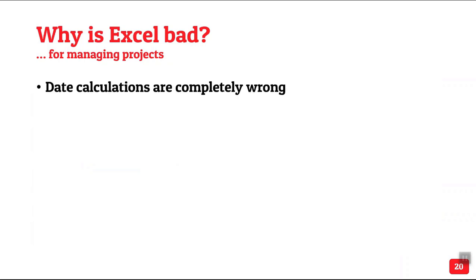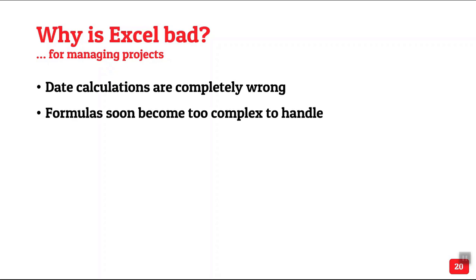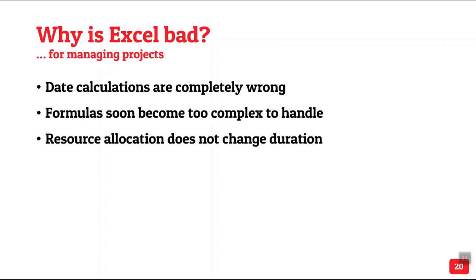First thing is you will typically put date calculations. You will put a column called task, start date, duration. And then the next start starts based on a formula. That is wrong because when you say duration, it does not include weekends. So always your calculations are wrong. We take the previous task end date as the starting date of next task. That is also wrong. It should be next plus one. So inherently it is flawed. Very soon the formulas become so complex that we just don't bother about them, making it inaccurate.